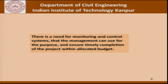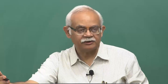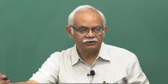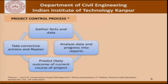If in the middle of the project we find that we are slipping somewhere, we try to look at what additional resources can be deployed and how resources can be diverted from one activity to another to ensure the project is completed in time without exceeding the overall budget. The project control process involves gathering facts and data, analyzing the data into reports, predicting the likely outcome of the current course, taking corrective actions and replanning. Once replanning is done, we go back and find out whether that is working — so we gather facts and data again, and this cycle continues.